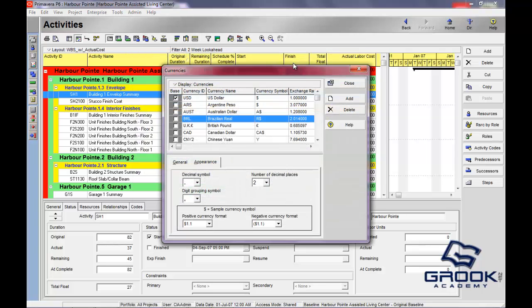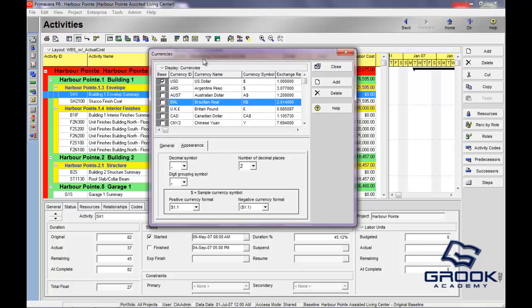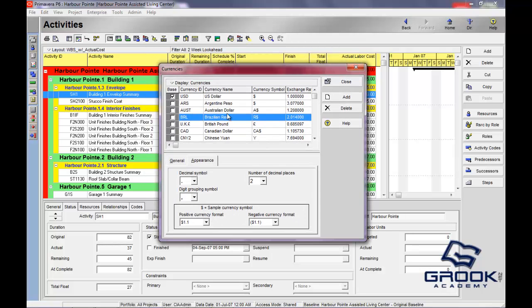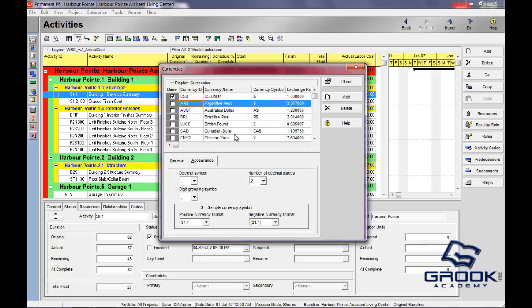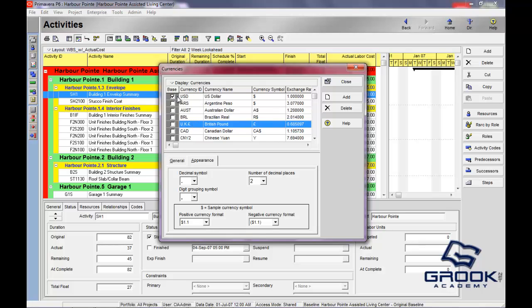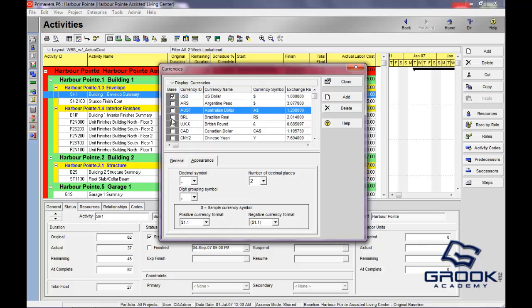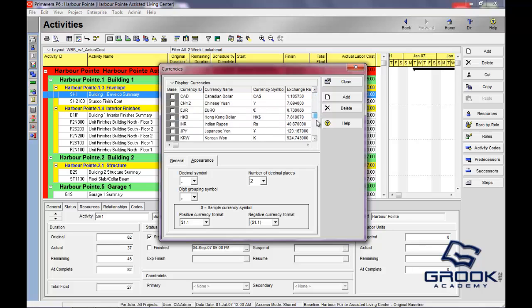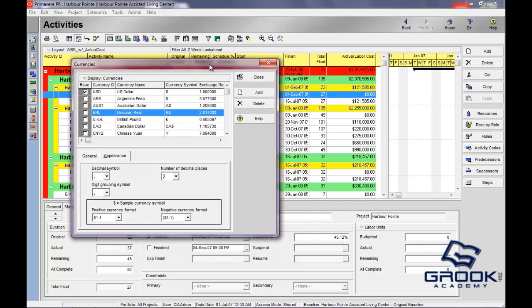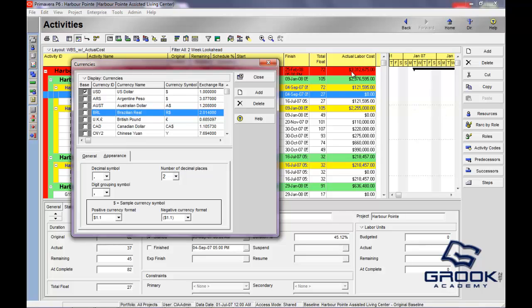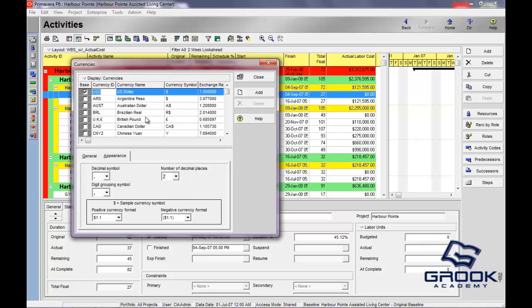Lastly, we're going to cover currencies. Currency is a little weird. I would like to see them change this. I think the interface is a little misleading. It makes you think that you can just choose one of these. Like, I can make the British pound the base currency. But you can't ever change this. So this check box is not changeable. You can't check it or uncheck it, and you can't check anything else. But what you can do if you'd like to change the base currency, you can see that this project, the scope for this actually doesn't have to do with projects. It has to do with the entire software. So if you were to change the base currency for here, it would be throughout all projects. You'll see here that the actual labor costs are all in dollars.